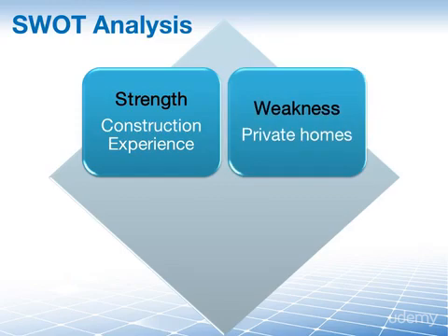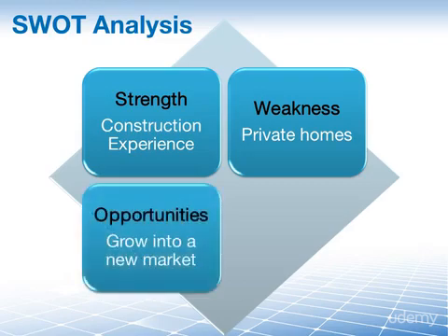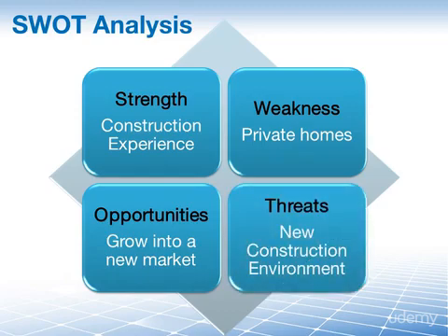Weakness, our experience lies mostly within the private sector, building private homes and not with commercial buildings. Opportunities, this will enable us to grow into a new market as well as differentiate ourselves from being just a pure home construction company. But threats, the resources on the project may not feel comfortable working in this new construction environment. As you go through the four dimensions of strength, weakness, opportunity, and threats, you can evaluate how an organization's strengths can offset a weakness or how opportunities may outweigh or overcome a threat.